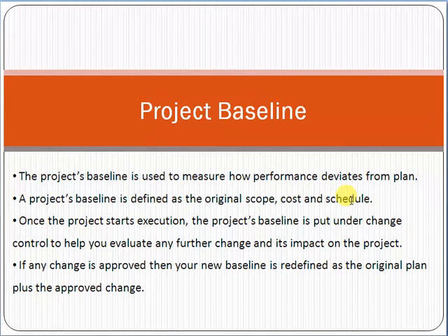One more thing: when you start the execution and you check the deviation and you understand that you need some change request, you need to analyze the change impact, and if the change is approved, then the new baseline will be redefined as the original plan plus the approved change. Are you getting my point?